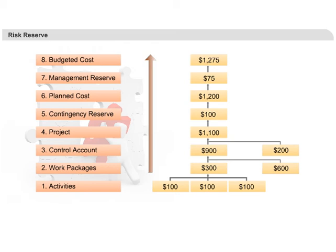Once the planned cost is arrived at, another reserve gets added, and that's called management reserve. By adding contingency reserve, you have taken care of known uncertainties, and by adding management reserve, you take care of unknown uncertainties. But on what basis do you add for unknown uncertainties? It's totally based on experience, or what we call in PMI language, expert judgment.